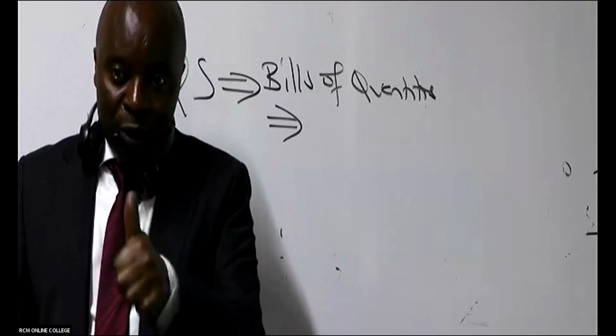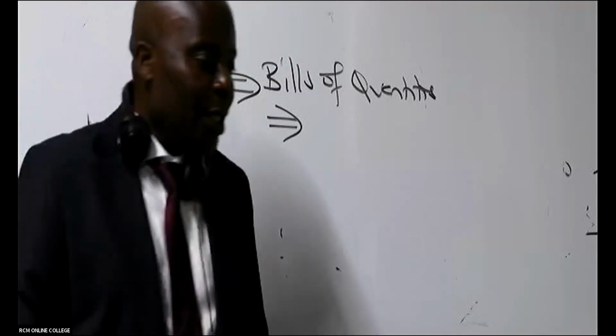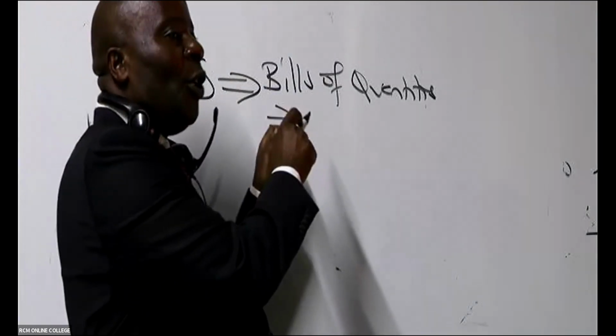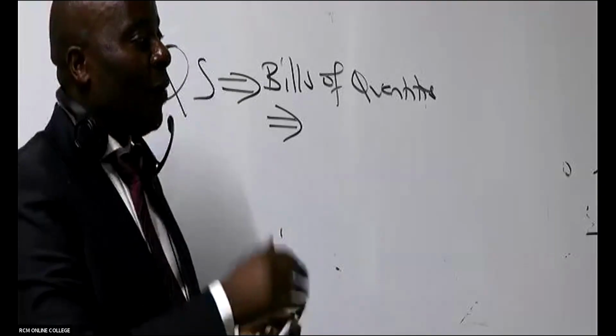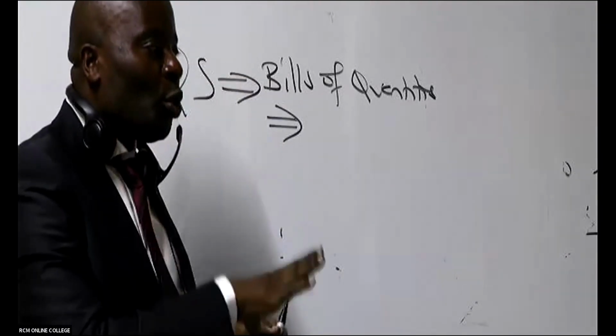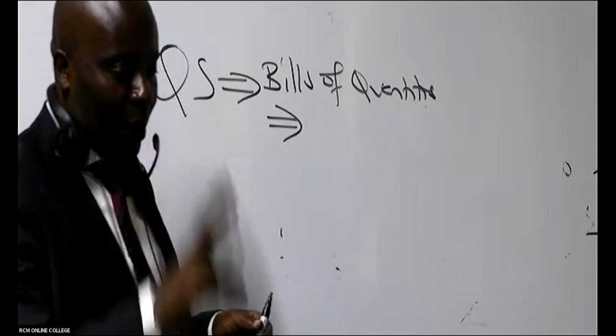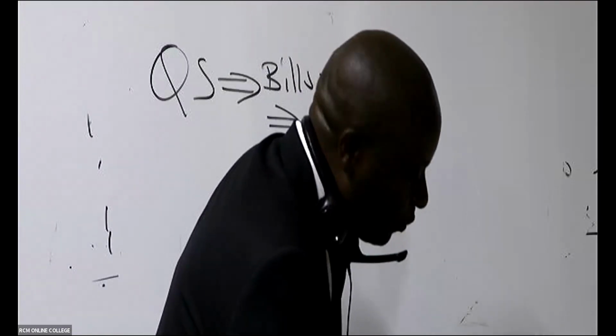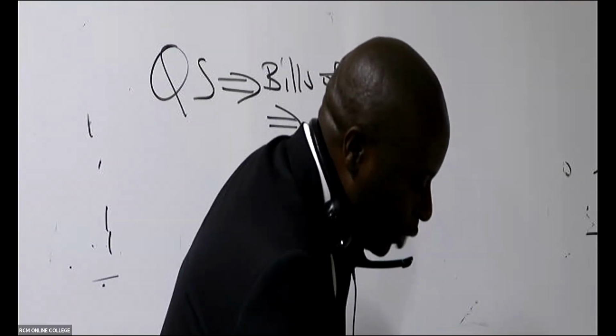So it is precision and accuracy, because in this case you are coming to the nitty-gritties. They'll tell you, for example, that you need an excavator, and this excavator should be of this type. They go to very granular, tiny details. So the first advantage is that you're going to get very accurate estimates, which are very good for production purposes and setting of selling prices.